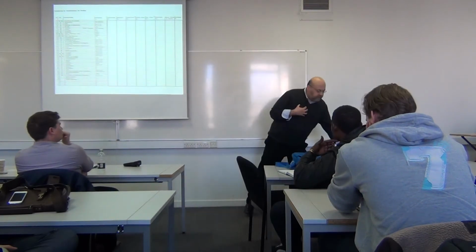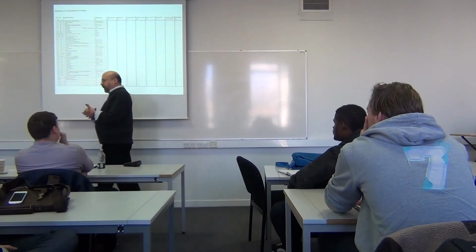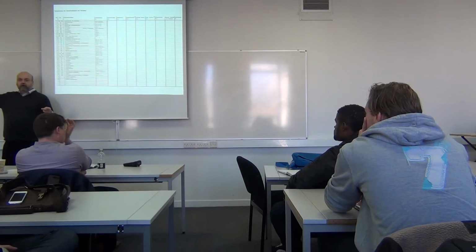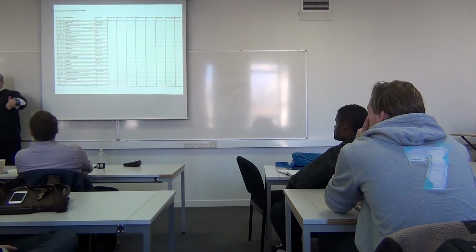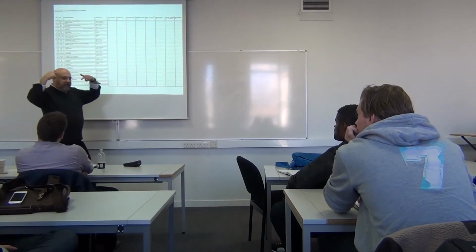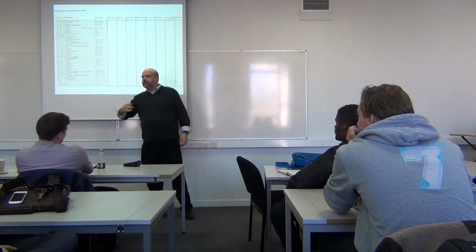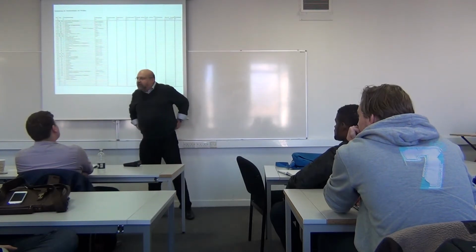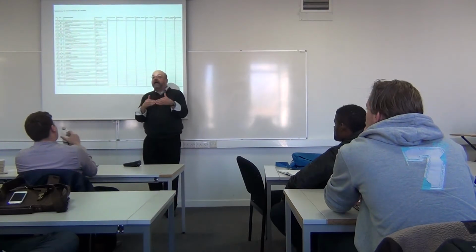I've already, as main contractor, got my contract, and I know, okay, I have to start with the first works, let's say in 4 weeks. But there are other works which start in 3 months, and other works which start in half a year, and others in 6 weeks or so. So I have to plan, I have to schedule. I've heard that schedule is American and schedule is English. I have to schedule my works as a contractor.